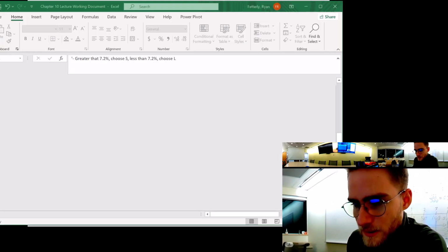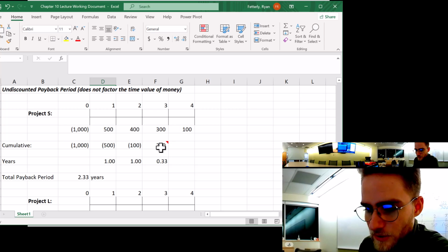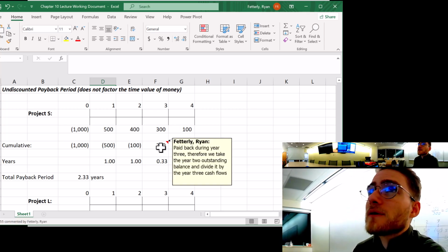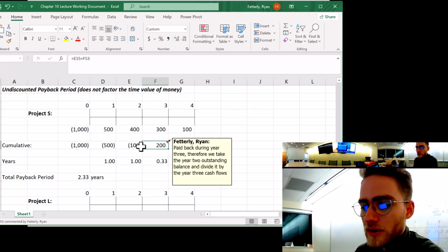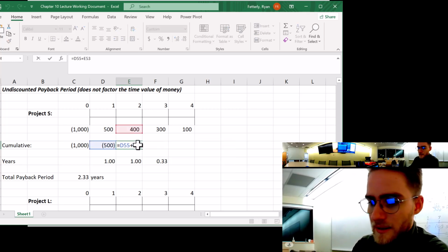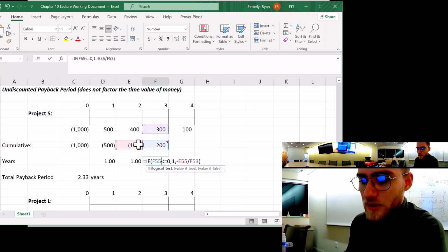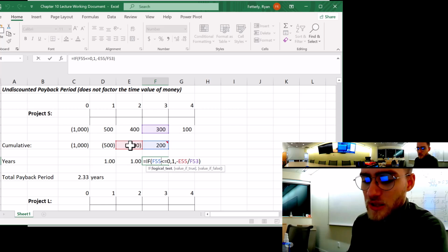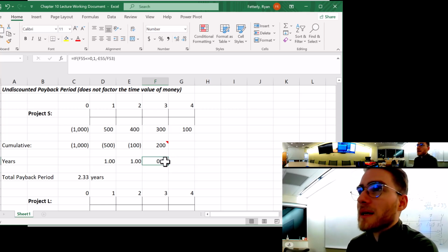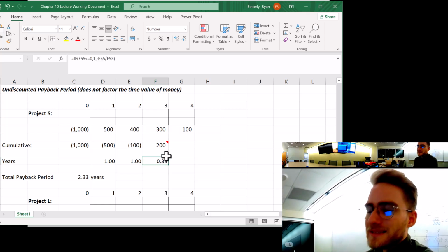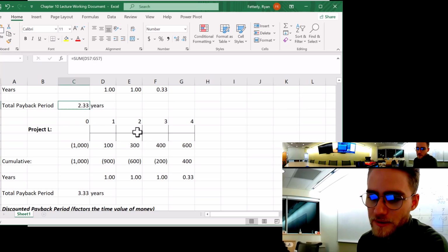Here it is. I hope I did it. Okay, so I'll release this so that you have this and you can go back and look at it. I also added notes in here for you so that you can track my calculations. But basically, it's at the point where your cash flow becomes positive, you just drag it and carry it over. When your cash flows become positive, your cumulative cash flow, that's when you do your calculation: what is my cumulative cash deficit, and divide by the inflows. Do not worry about my formula. Pretend you didn't see that. But yeah, so 2.33 years is what it would take, right?